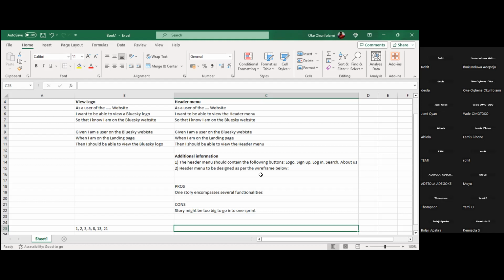Initially I used to feel bad that I had not done good work, but no, it's not on you. So what I do in cases like that is ask what additional information they are seeking. Then they tell you, and you go back to your stakeholder, because sometimes there's no way you would have known, as they are coming from a technical angle. Sometimes the stakeholder doesn't even have the answer, and you say, please point me to your technical person, maybe an architect, to answer that question for me. So yeah.